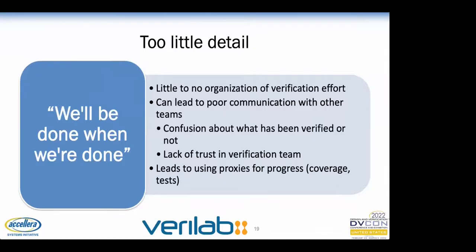Coverage is a great way to figure out what is being missed or to detect that a change has an unintended side effect, but it's a terrible way to predict how much longer things are going to take, especially when we remember that the percentage can go down when we add more coverage points or more RTL. If you've ever spent a meeting explaining why the coverage went down again, it may be because somebody's using coverage as a proxy for progress.